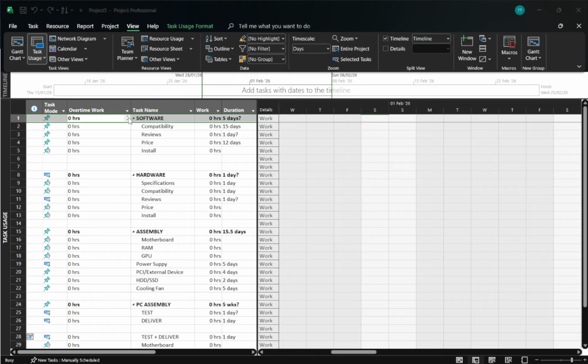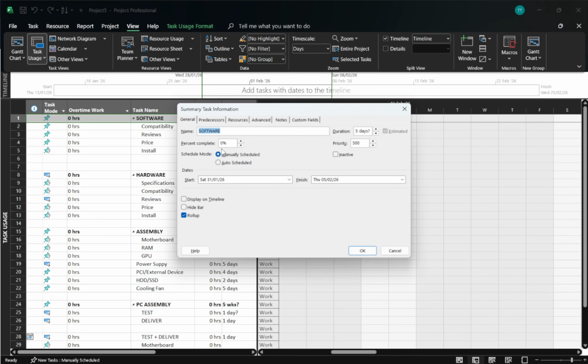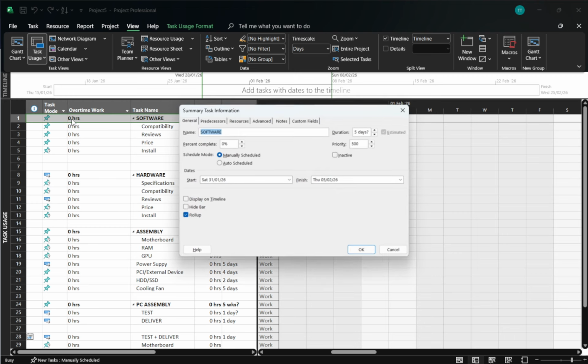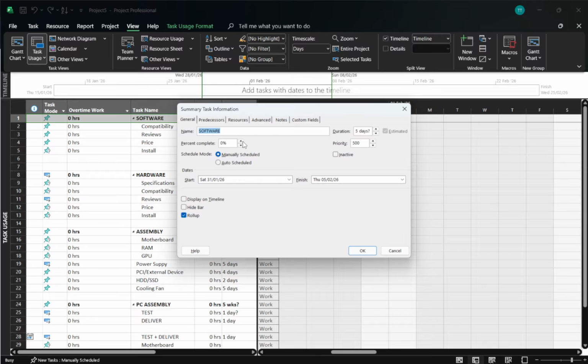Microsoft Project will automatically keep normal work and overtime separate. The regular work field stays as is, and anything you add to overtime work is flagged as overtime, which helps with both reporting and cost calculations later. A quick tip: make sure you're typing overtime on the assignment row, not on the task summary row. Overtime is tracked per resource assignment, so entering it at the assignment level ensures the right person gets the right